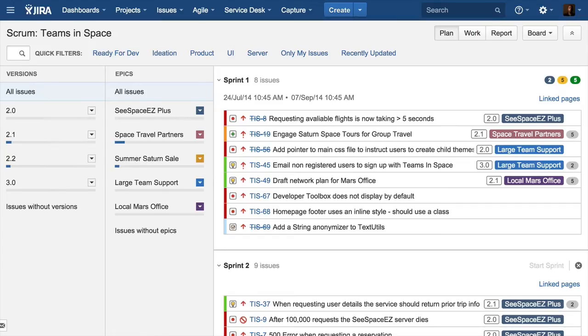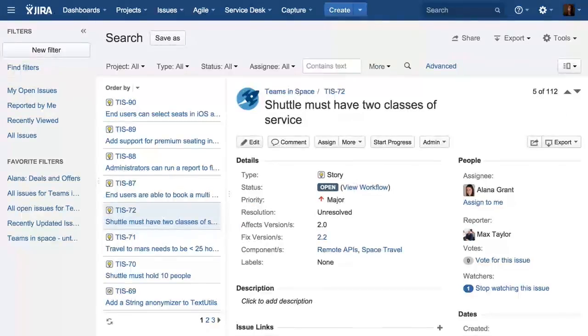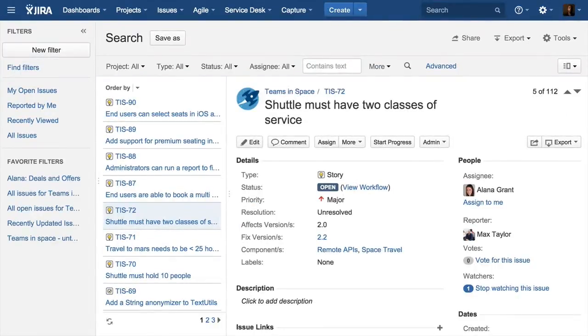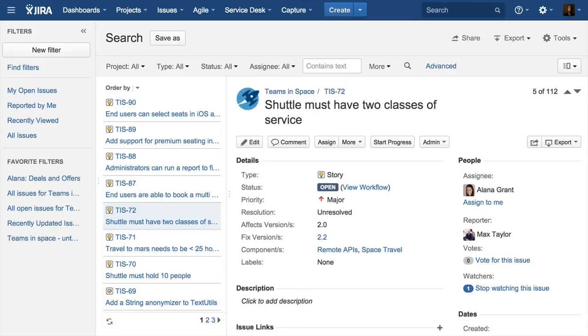I always advocate: bring the team in when you're planning. Have those discussions transparently so that people understand not only what the decision was made, but why it was made, how the group made that collective decision. Jira Agile in plan mode is a great way to do that, but also the detail view in Jira. This was new in Jira 6. You can see on the left-hand side, there's a listing of issues, and on the right-hand side, there's a pane that you can work with the issue. What's really cool is that as you're triaging a set of issues on the left-hand side, if you need to jump back to an earlier issue, that's easy to do. You've got detailed views for your issues, but then you also have an easy way to scan through the set that you're triaging.